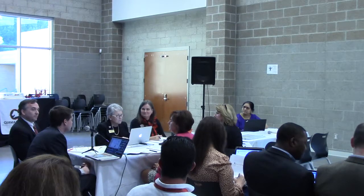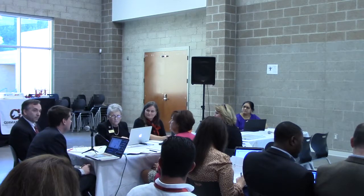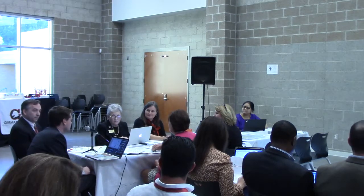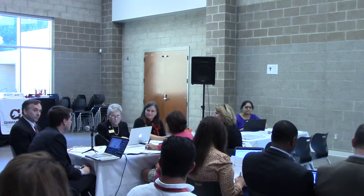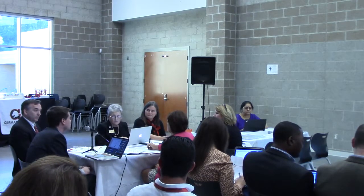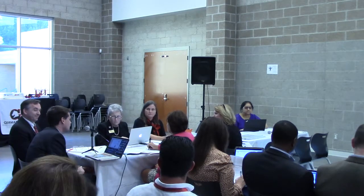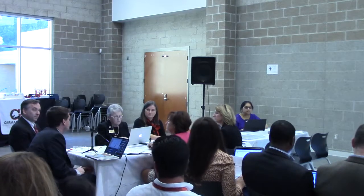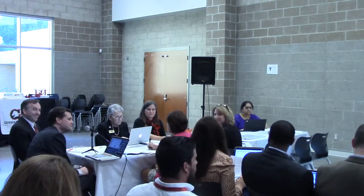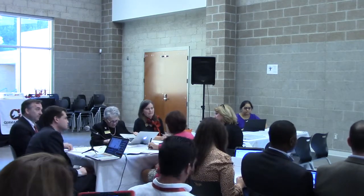We have already gone through the Board of Zoning and Appeals and gotten approval there. We are scheduled to be on the Planning Commission November 7th and the Design Review Commission November 28th. We are also meeting with neighbors of the new site October 26th, this Thursday at 6 p.m. right here in the multi-purpose room. We sent out letters to everyone in a certain radius. I hope Meredith got the letter. Very good.